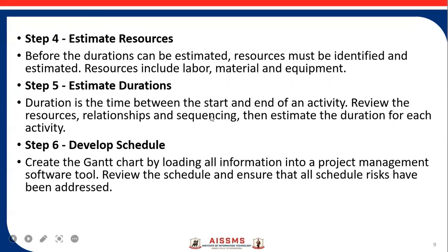Duration is the time between the start and end of an activity. Review the resources, relationships, and sequencing, and then estimate the duration for each and every activity. Estimating the duration depends on the availability of the resources as well as the relationships and sequencing between the different activities. Based on that only, we can estimate the durations.